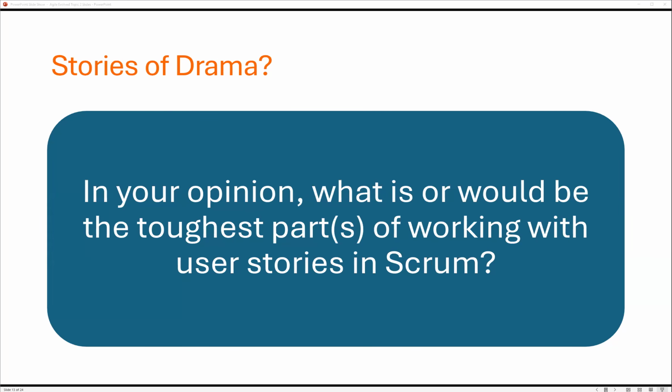Somebody's asked, how does product development come in the first iteration? Well, I think we should also put that into the Sprint Zero discussion that we're about to have. The whole thing is development from start to finish, because it's perceived that there's going to be some unknowns and uncertainties, but you get the highest amount of uncertainty at the very start. And one of the goals of the first sprint or few sprints is quite specifically to aggressively attack the most important unknowns and the dependency unknowns and tackle them first and foremost in the first sprint or three.